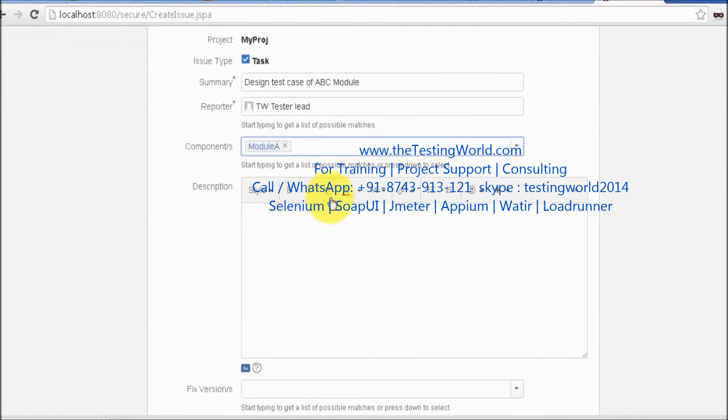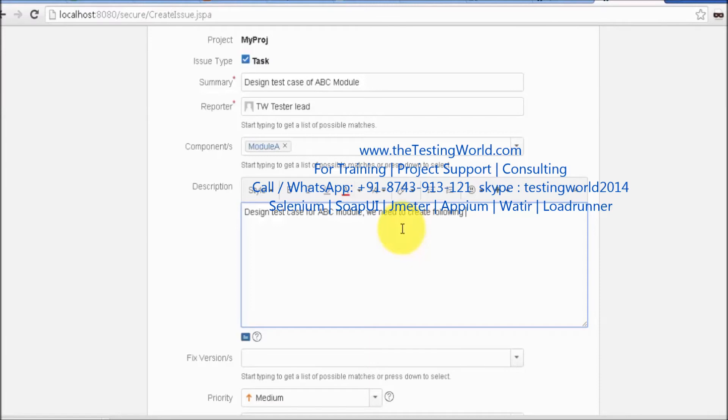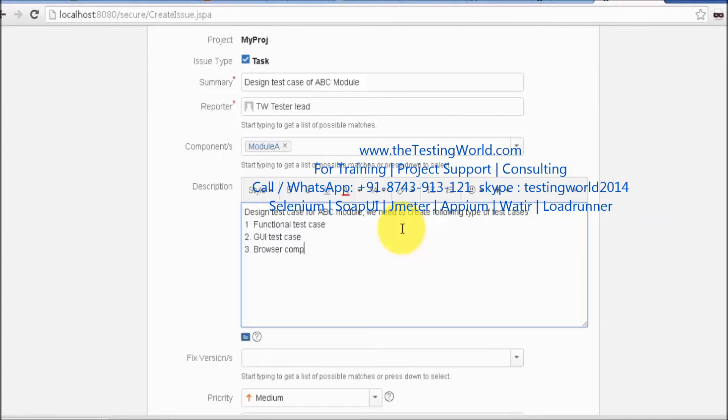In the description: Design test case of ABC module. We need to create the following types of test cases. First, functional test cases. Then GUI test cases, and also browser compatibility test cases.